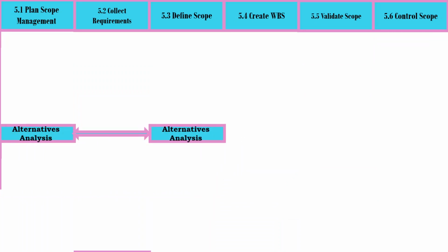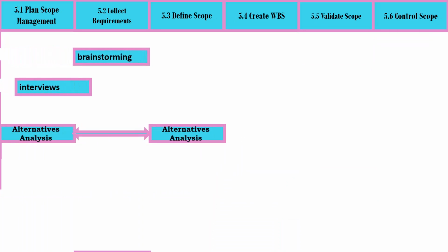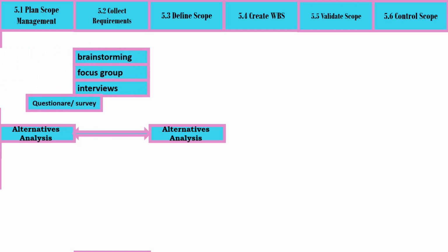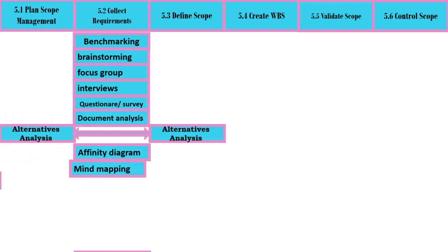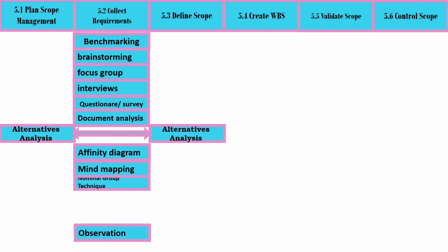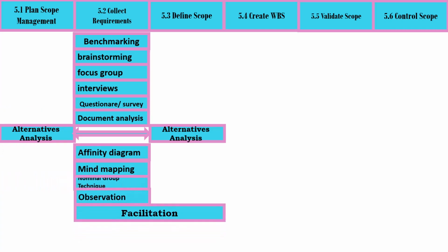Collect requirements has data gathering, such as brainstorming, interviews, focus groups, questionnaires and surveys, and benchmarking. It also has data analysis, such as document analysis, data representation, such as affinity diagrams and mind mapping, interpersonal and team skills, such as nominal group technique, observation and conversation, and facilitation, which is shared with defined scope, and decision